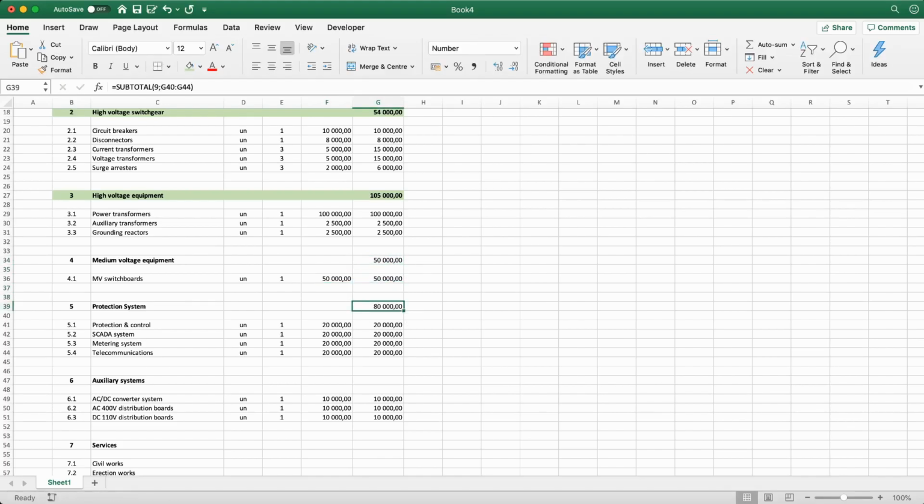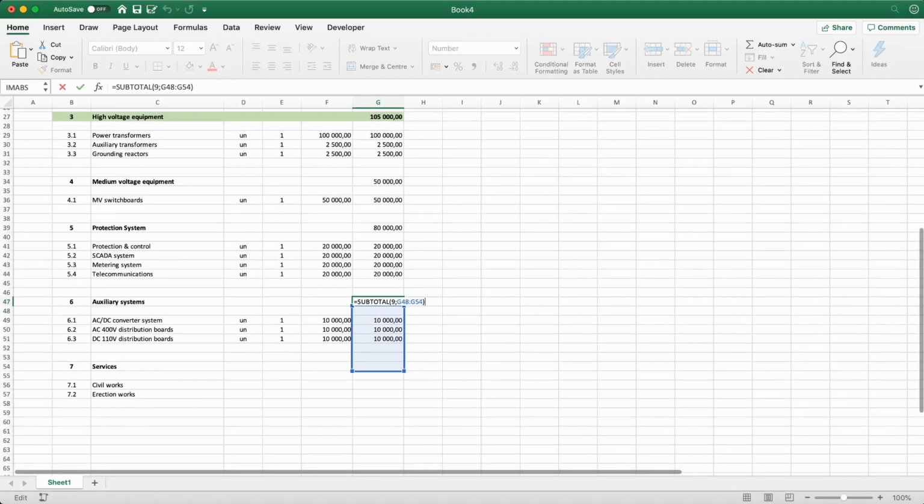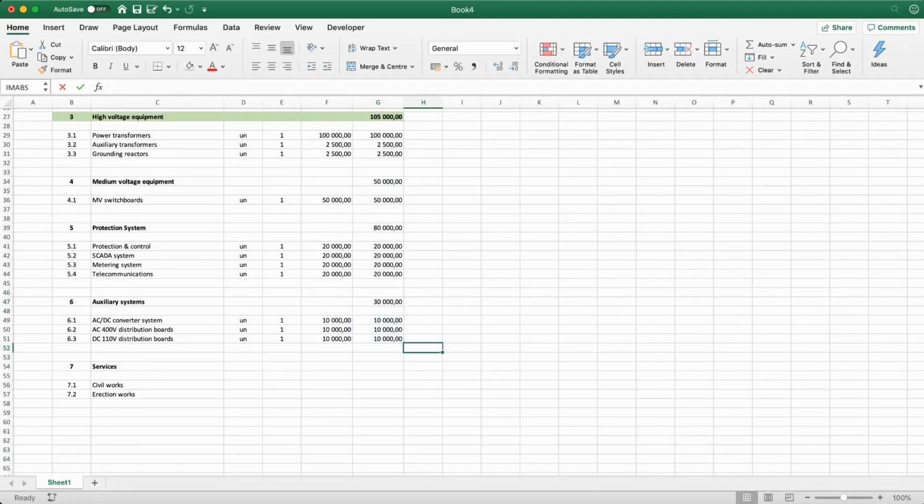I can also copy this, of course, and readjust the scope. Just make sure that once you make the copy, you always adjust right after. So don't copy all subtotals and then try to arrange them, because oftentimes you need to adjust something in between, then you forget to adjust the ranges. Then you'll have a problem that most probably will take you much more time to debug once you are working on the final tuning of the calculation.